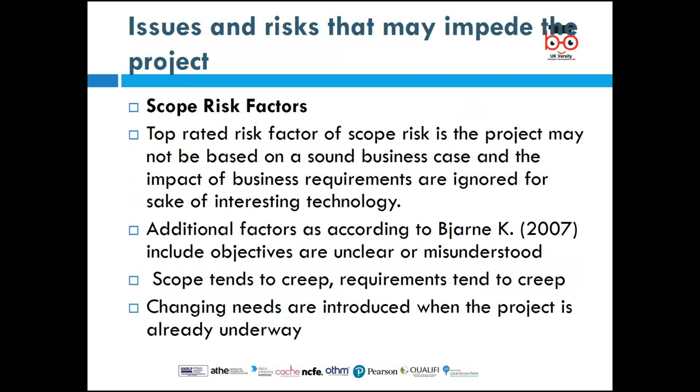In the next slide, we'll look at issues and risks that may impede the project. One of them that we'll look at is the scope risk factor. Scope risk is the top rated risk factor for any project that is to be undertaken. The scope of the project may not be based on a sound business case, and the impact of the business requirement may be ignored for the sake of interest in technology.